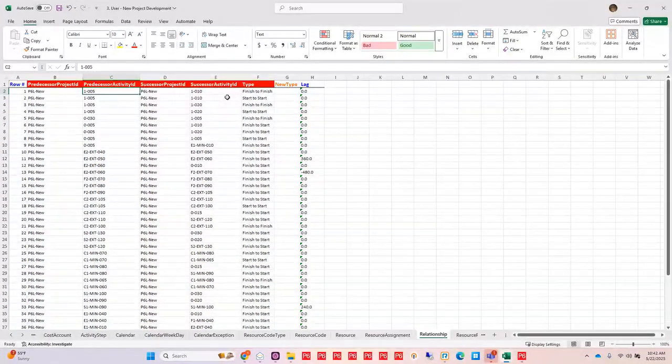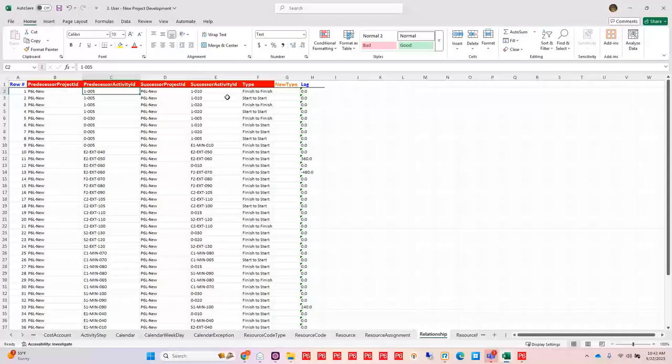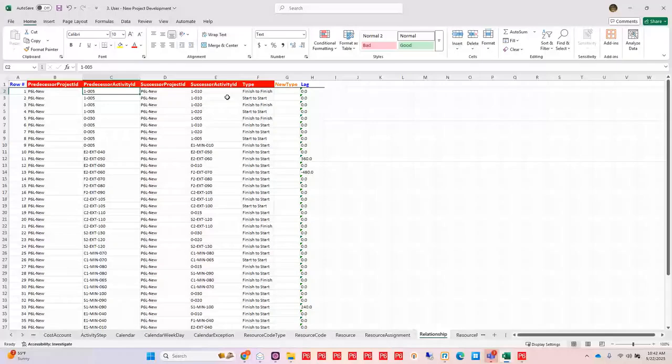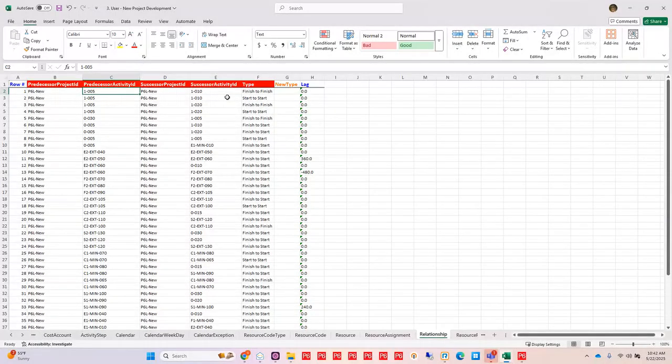So if you have any contractors that maybe you're receiving schedules from with updates, and you've got that tied to a master schedule, it's very easy to recreate those cross-project relationships when you get a new project in, a new update, because you could just run an already saved sheet with your relationships in it that are going to define the relationship between those projects.